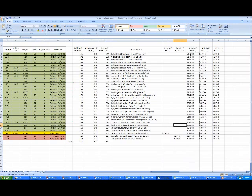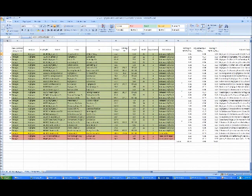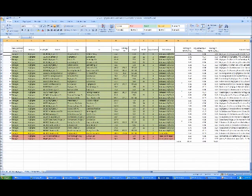The relationships were developed because in the business of street resurfacing, and I'm going to use the spreadsheet that I'm pointing to here, we know that we need to mill a street before we make an adjustment to the utility adjustments on that street and before we resurface that street. So there's a natural flow of finish start from left to right on each of those facility IDs. And then the other driving force comes from the order that we gave the streets over here in the first column. We said we're going to do this street before we do this street, and so on down the list.